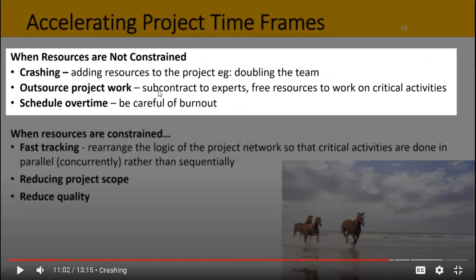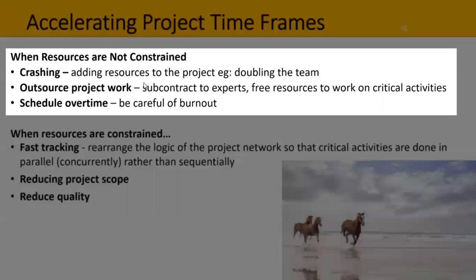Does this ring a bell? Outsource project work, subcontract to experts, free resources to work on critical activities, schedule overtime. Yeah, so this right here, we use a lot of Chinese contractors to do this. We also use a lot of contracts on our projects in Jamaica with the Chinese. They get it done faster, for less money. You might also schedule some overtime, but be careful here of burnout in the project team.